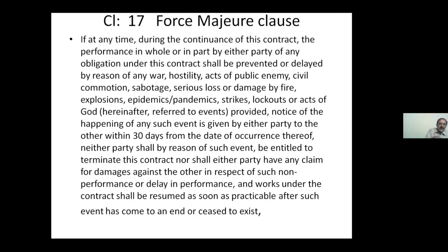After normalcy is recovered, then the whole contract schedule will be rescheduled. The time for completing the remaining work will be rescheduled again without any imposition of any penalty or liquidated damages. This is about the force majeure. This is available both in stores and works contract.